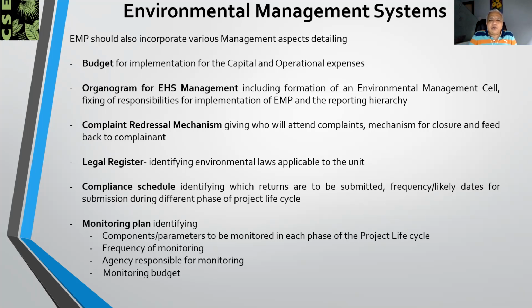Then the compliance schedule should be fixed, like what are the returns to be filed, the frequency of filing returns, and the likely dates for submission during different phases of the project lifecycle. And a monitoring plan should be included, which covers all four phases of the project lifecycle. That is the construction phase, erection and commissioning phase, operation phase, and closure phase. All four aspects are properly defined.